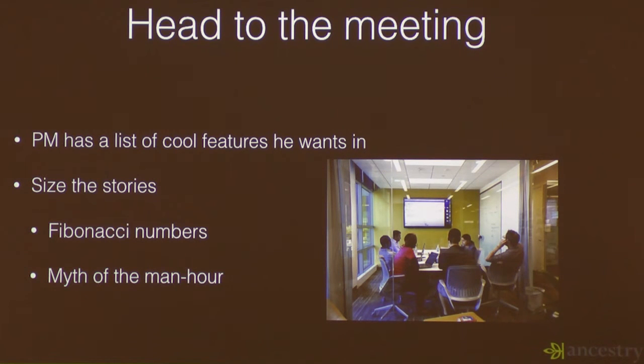They're still out there anyway, but not really in the Agile process area so much, but more into the waterfall and the spiral processes. There were things called man hours, where you say so much work is going to take so many man hours, but that's kind of been disproven by a few people. And so that's why we use the idea of effort and not time, because you can't really estimate time very well. Programmers are really bad at that, but we can estimate effort. We can say, look, this thing's nastier than this other thing I worked on, so I'm going to give it a 13 and not an 8. So you can do that.